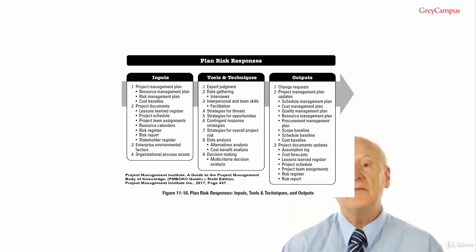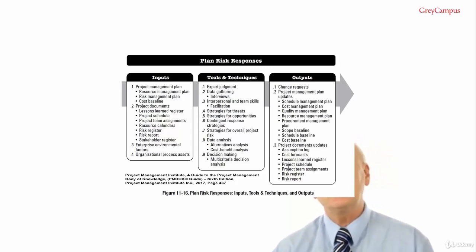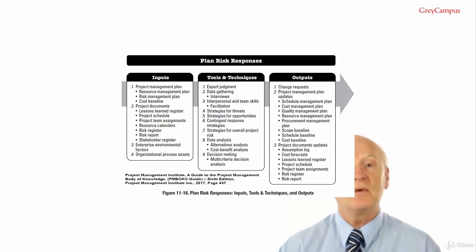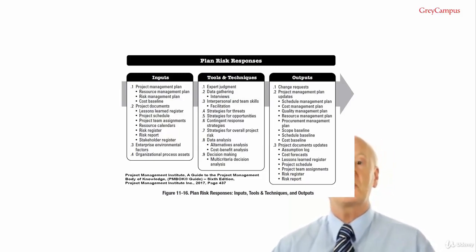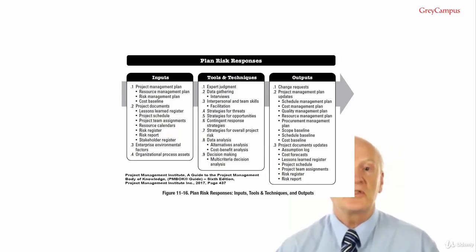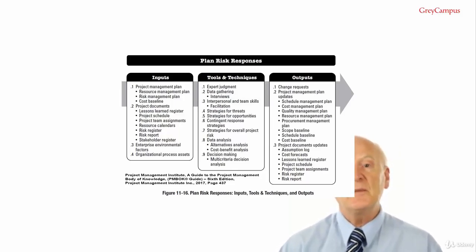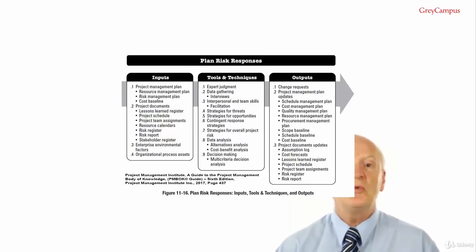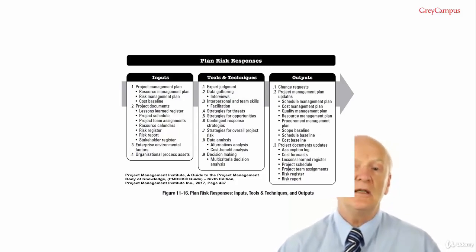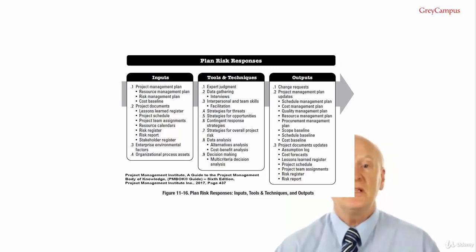Exploit. Where the level of overall project risk is significantly positive and outside the agreed upon risk thresholds for the project, an exploit strategy may be adopted. This involves taking focused action to capture the positive effects of uncertainty on the project as a whole. An example of exploiting at an overall project level would include addition of high benefit elements to the scope of the project to add value or benefits to the stakeholders. Alternatively, the risk thresholds for the project may be modified with the agreement of key stakeholders in order to embrace the opportunity.